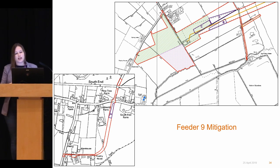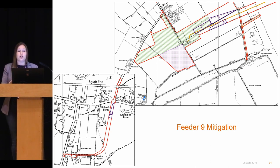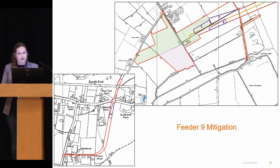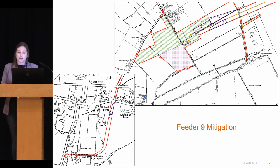Regarding mitigation, timing was really crucial for the client: they needed the new pipeline operational before damage occurred to the existing one. Through the pre-application assessment, a mitigation strategy was developed and discussed with the client early on. Having those conversations early allowed archaeology to be planned into the construction programme, and the archaeology was completed on site pretty much to schedule, allowing construction to proceed along their planned programme. The team also collaborated with ecology colleagues regarding important bird species along the Humber Estuary and badger setts in the area—making sure everyone was involved and knew what needed to be done.